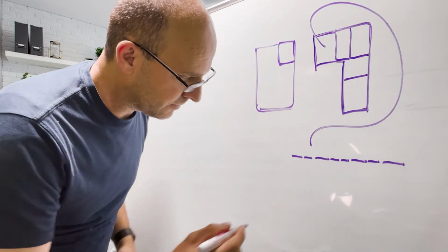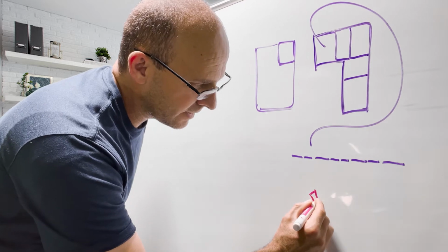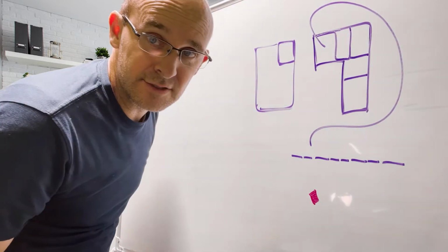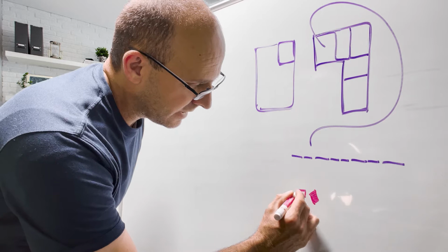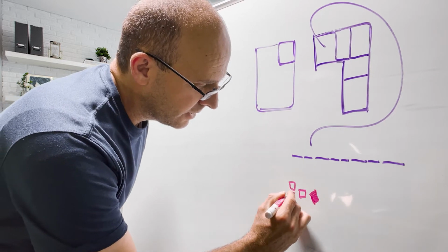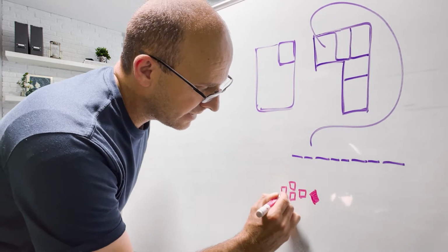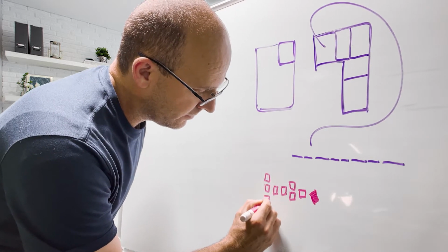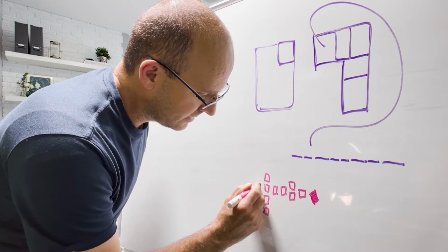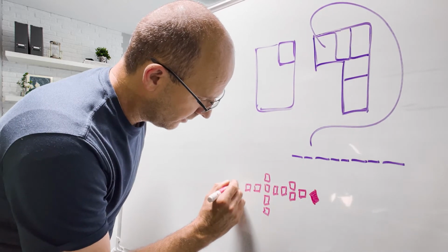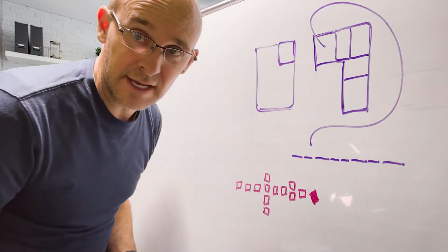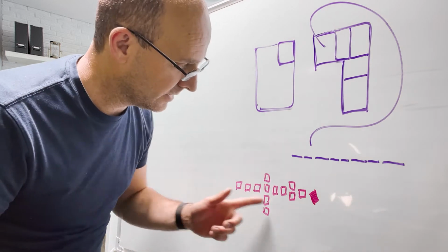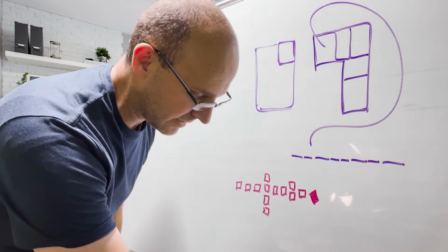When you do a pull plan, usually you have a milestone, and that milestone is at the end, and you pull the activities backwards in a sequence. You might have some activities that stack, you might even have some where quite a few stack. So when we're pulling backwards, we create this sequence. This is a pull plan. It really is nothing other than a collaborative takt train.